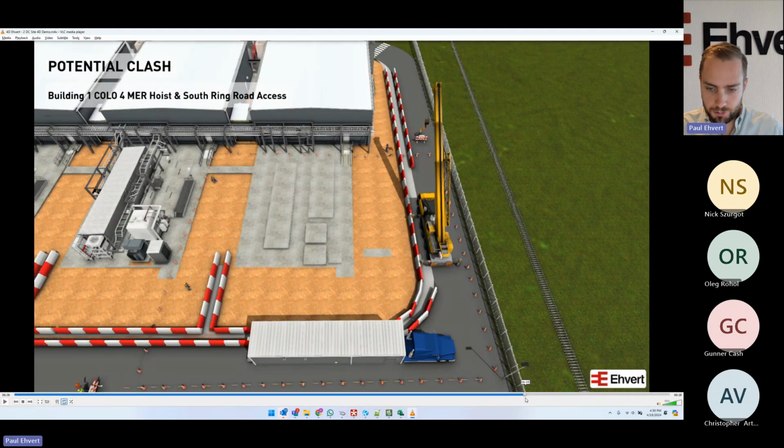So as we're showing it coming in, we'll show the truck coming in, where you see here this was an external electrical unit, external electrical room. So say we're starting at the base, you'll have your fuel tank and bracing, and the stair will come in as one unit on a truck, and then we'll show a crane that lifts that into place on the foundation.